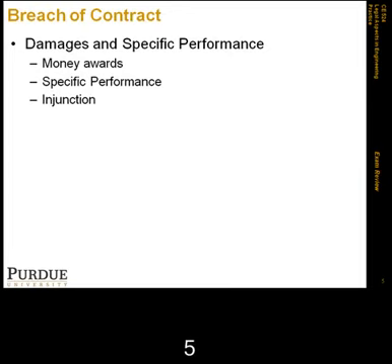We talked about the fact that maybe a specific decree is more effective because it's a personal command by the judge, and it's more effective as a remedy, because if the party fails to comply with the judge's order, they could be brought to explain their non-performance. If the explanation wasn't satisfactory, they could be punished with a fine or imprisonment, because they could be held in contempt of court. Most awards in construction have no specific performance, and mostly they have money awards. It's usually the case that's the adequate type of compensation.